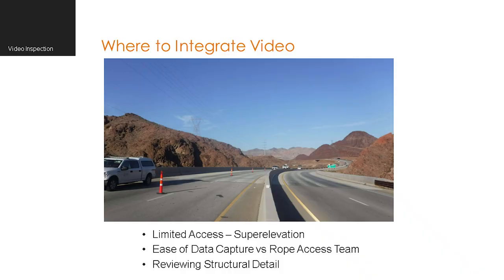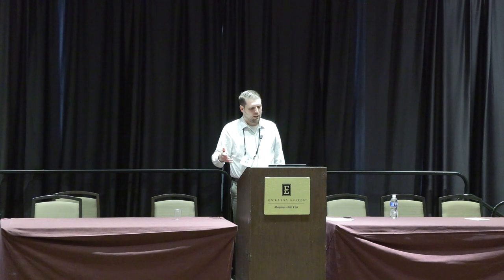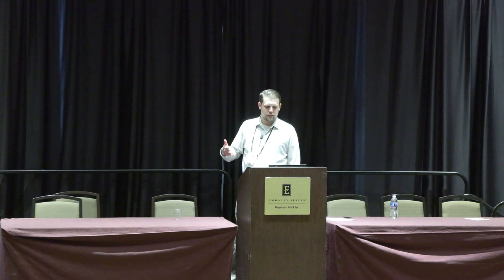Now let's talk about how we're using this as a tool for video and photos. We have a bridge south of Las Vegas with a heavy super elevation. We could use a snooper truck on one side but couldn't get to the other side — the super elevation was so heavy we were already at our tipping point and unable to deploy. Snooper truck was out; no roadway underneath for a bucket truck. A climbing team was valid but takes a lot of time and effort for a relatively new structure.